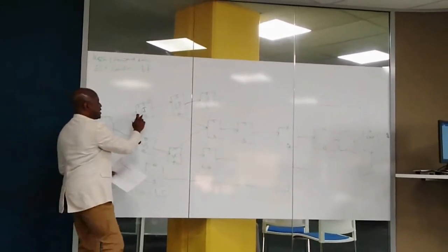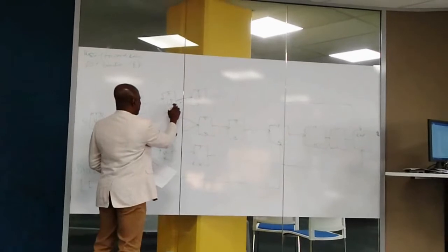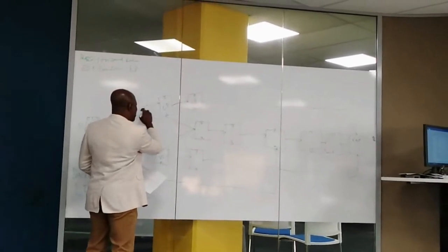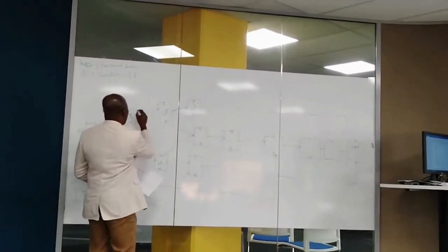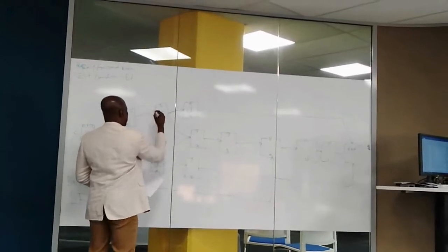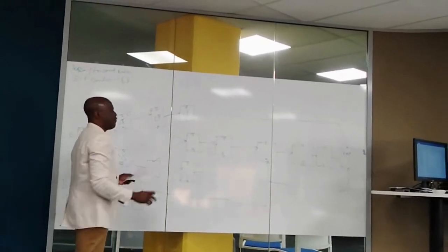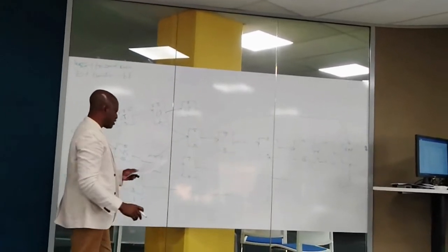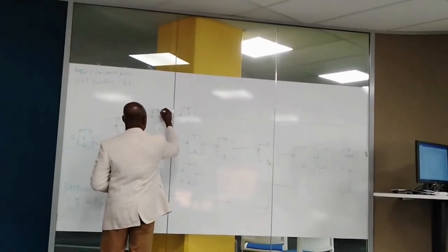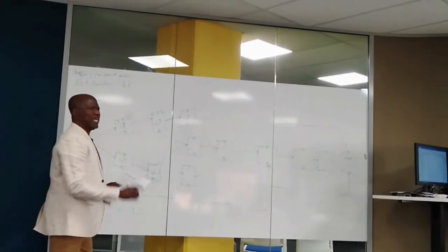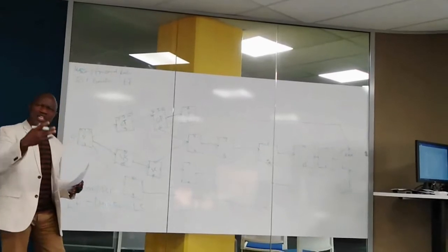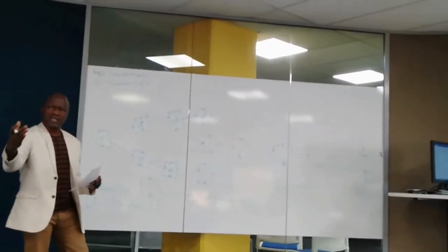This activity here is dependent on this, and it has to be completed before this. We have 6 here, we transfer it here. 6 days here before, it's not going to be 9. 6 plus 6, it's going to be 12. You have to take into consideration the connection of this activity one by one.